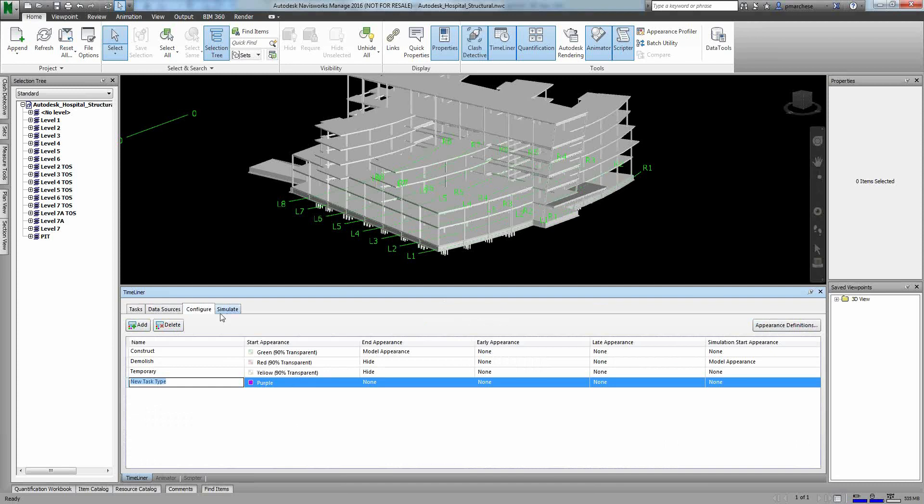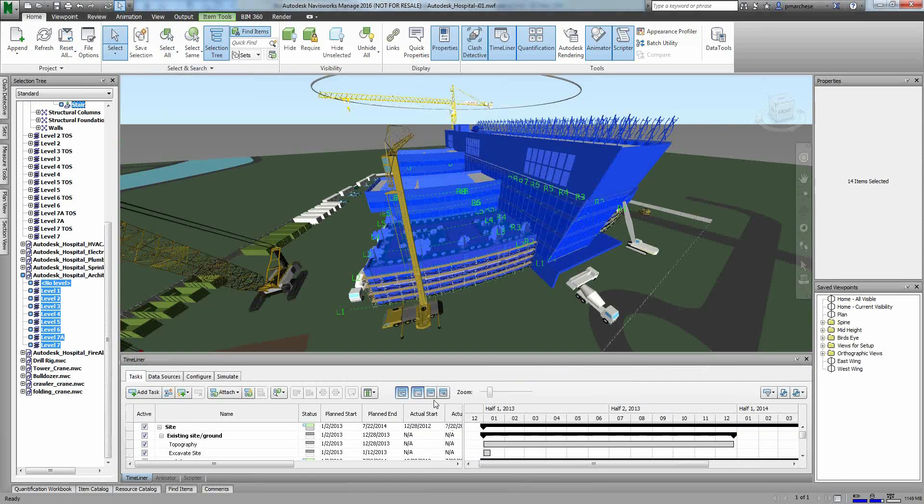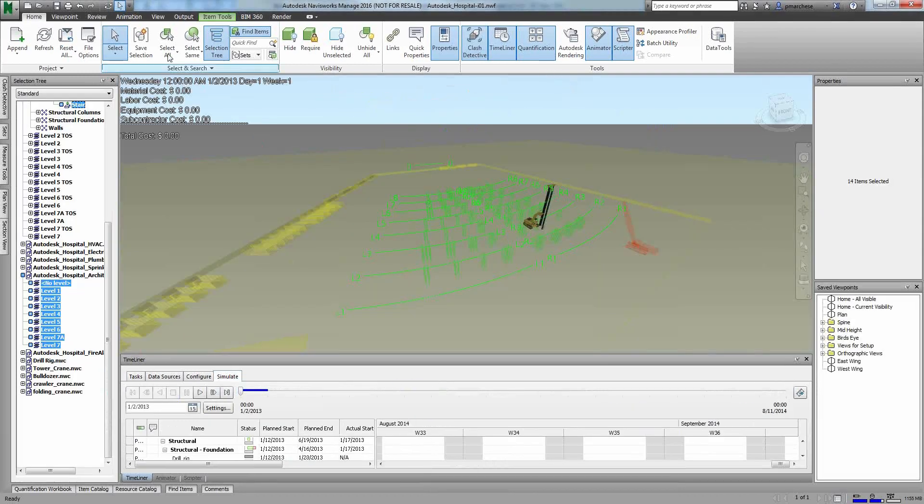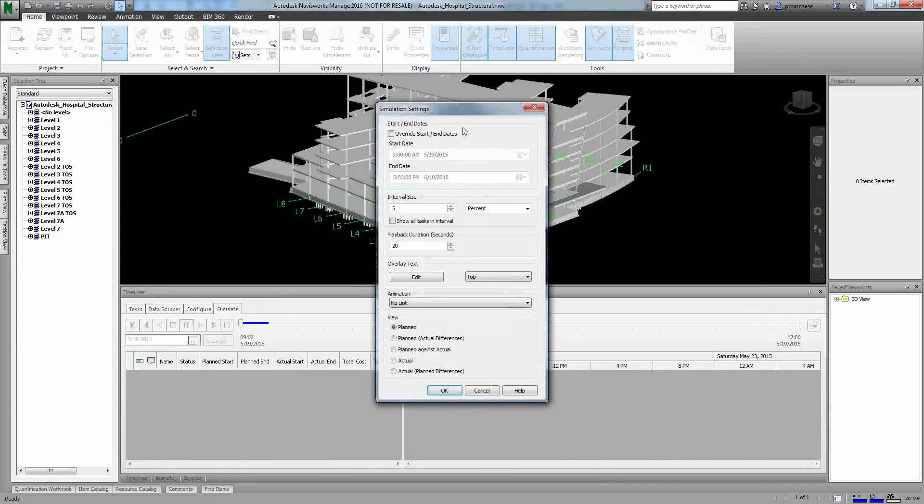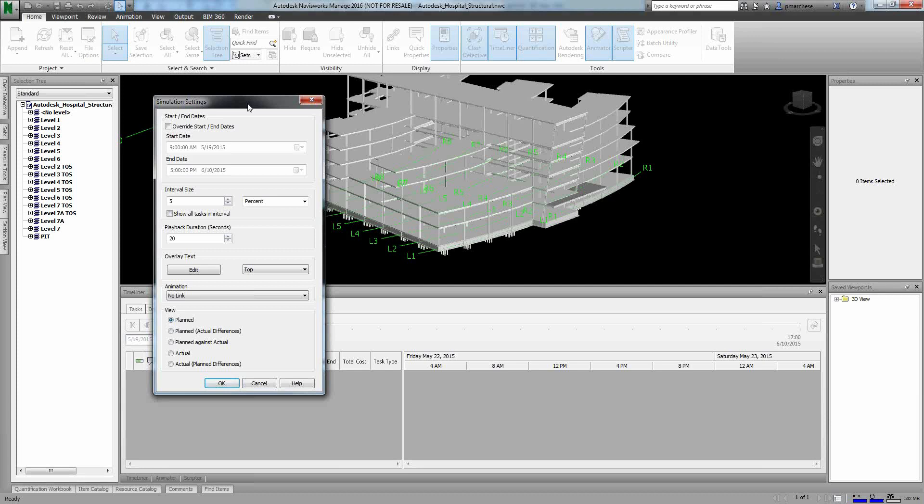So I can configure my appearance, go to simulate, tell it to run. And you notice over here, all I really have is the date. But when I was in that other project, I had a lot of information that was showing up in the upper left-hand corner. I had cost, I had cost of individual components or parts. So what I have to do to get that to show up is just modify my settings. So if I hop over here and just click on the settings button, I can tell it when do I want to see this video, or when do I want the video to be built on? So let's say you have a two-year project. We're already eight months into it. I don't necessarily need to see what happened on the first eight months. I need to see where we are. So I can tell it when do I want to start the simulation and when do I want to end it? I can modify the interval size, meaning do I want to see this as a percentage of my project? Do I want to see this for every day? Do I want to see this based in hours? I can modify the length of the video, so how long do I want this to be?